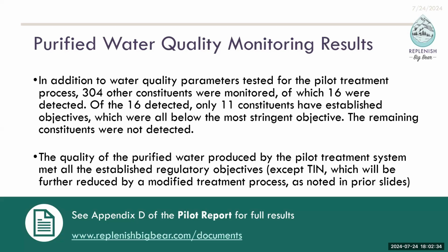So I think the impacts could potentially even be less, and they were already less than significant. So we don't anticipate a CEQA issue or a need to revisit. But we will be talking with the environmental and legal team about any changes that are made to the scope to help them make that determination. And if they determine that additional impacts need to be looked at, it would be a supplemental CEQA process.